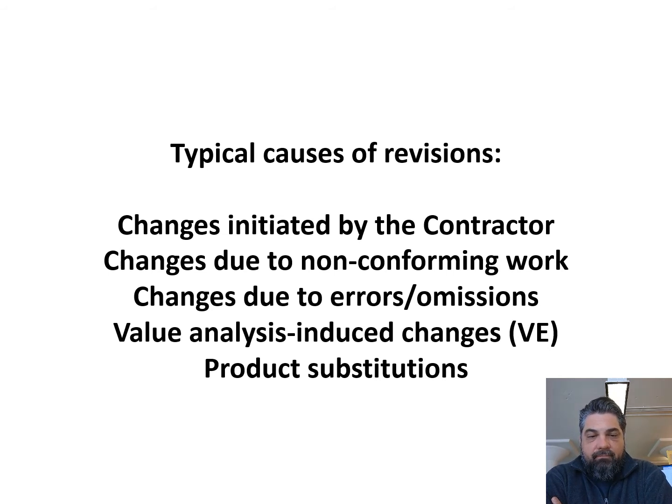And then the last item there, product substitutions. Similar sort of process where you may design or specify around a particular product, and then the contractor says, hey, if you go to this product, it's not what you designed around, but it's equivalent, and we can save money if we move to this product.